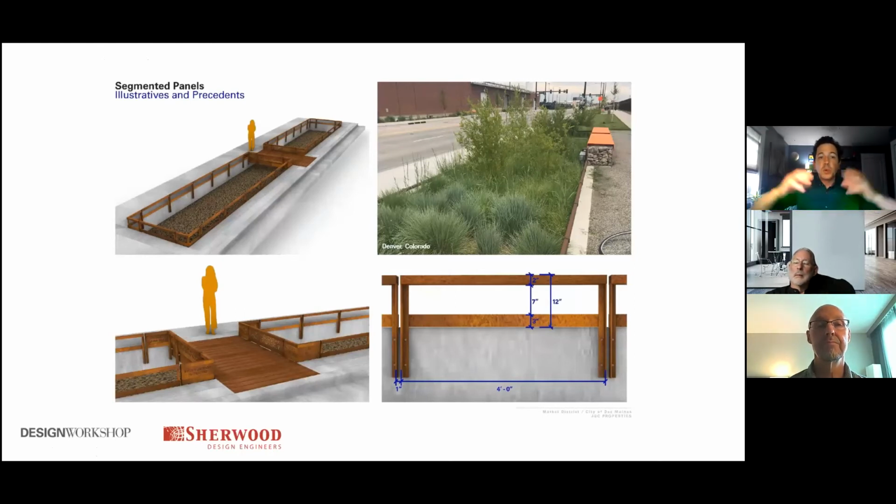see if we looked more broadly if there was another option that could reduce some of the capital expenditure related to it. And so what we identified is that the green infrastructure, the bioswales, made a lot of sense. They were co-optimized with the green space that was being designed otherwise for the landscape. But the below grade components that were really about stormwater storage for those big flood events, those were for more of a single purpose, and they were pretty costly.